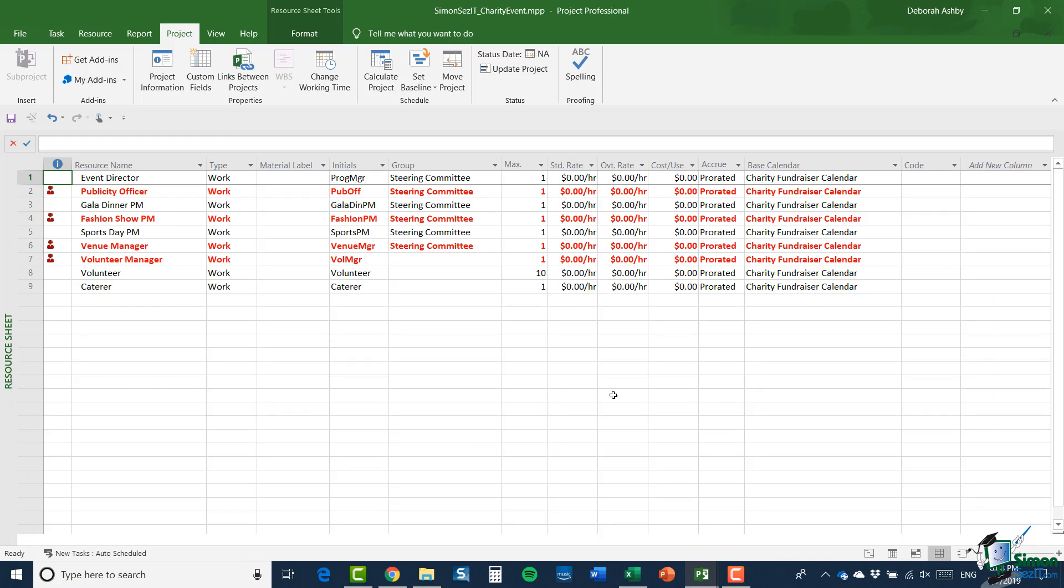And if you look now at the resource sheet, of course, now we're looking at the shared resource pool. And we have a ninth resource that's been added in there, caterer. So, that was a local resource for the gala dinner project. And now it's been added into our shared resource pool. Now, there's absolutely no problem with this person now being added to our resource pool. But it's important to understand that if in fact the assignment we wanted to make was one of the existing resources, we may have to do a resource replacement. On this occasion, we didn't already have caterer set up, but caterer is now part of our resource pool.